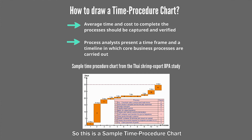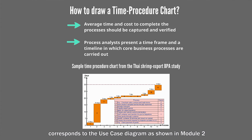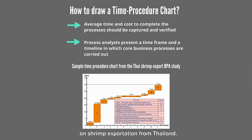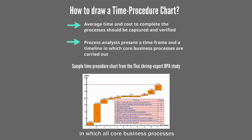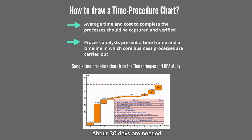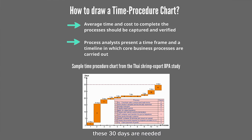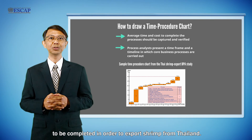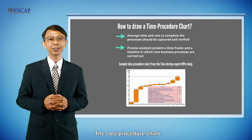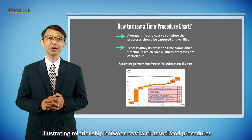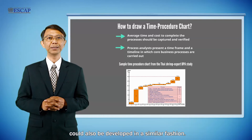This is a sample time procedure chart from the Trim Exportation BPA study. This time procedure chart corresponds to the use case diagram discussed in module 2 about the scope of a BPA project on trim exportation from Thailand. It symbolizes the time frame and timeline in which all 11 core business processes occur — about 30 days are needed to fulfill all these core business processes to export trim from Thailand. A cost procedure chart illustrating the relationship between cost and associated procedures could also be developed in a similar fashion.